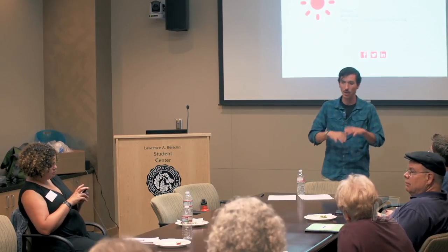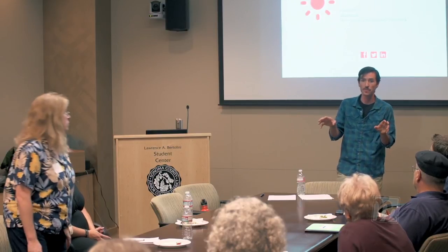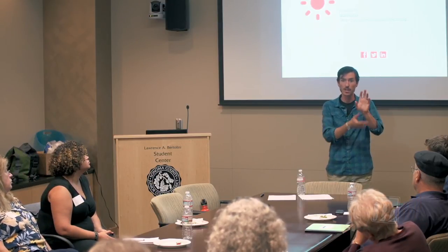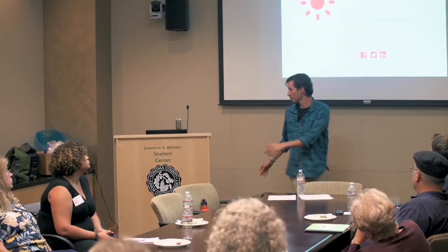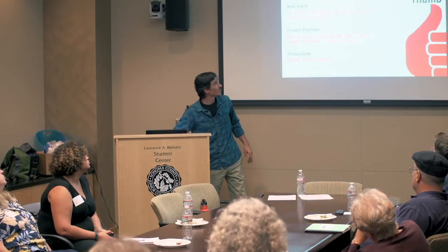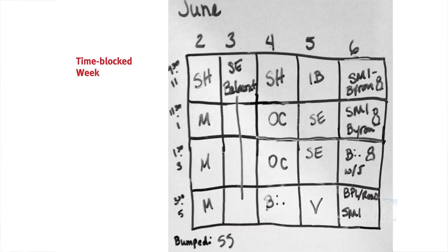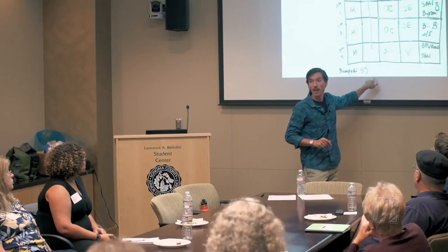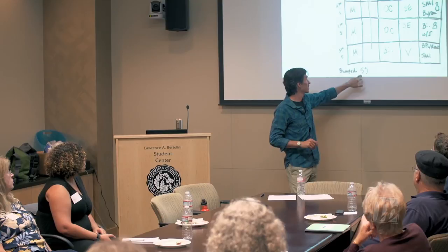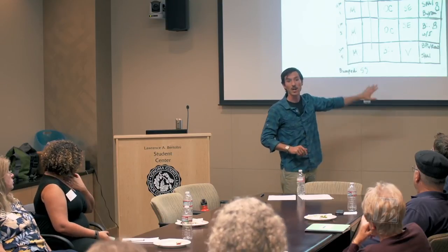The other thing that I didn't show on my week schedule is I have typically two open blocks. So that's 3 hours in the week where I can have flex. So if it goes over here, I also didn't show, I'll pull it up. If it goes over the time, this one got bumped. There was one block for this project that got bumped off of here.